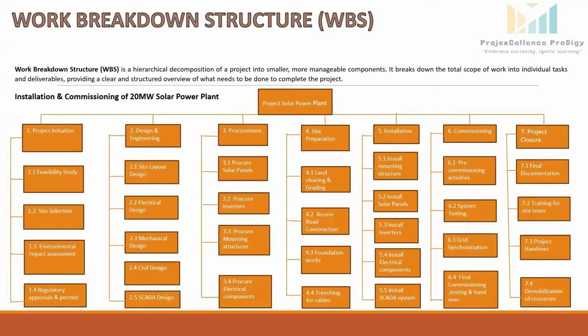So let's suppose in this installation control account here, a planning package is added, which is installation preparation and coordination. So it covers the high level preparatory activities before the actual specific installation tasks like mounting structure, install solar panels, inverters, and electrical components begin.